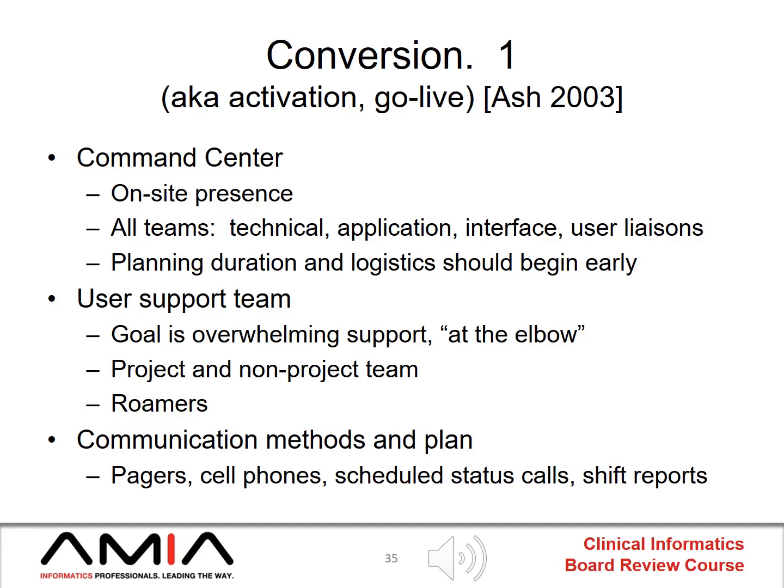In setting up a command center, one needs to consider logistics: where is it going to be, how large will it be, what workstations are needed, and so on. The command center is a place that minimizes the friction of communication between groups working on the system, because they're all quite literally right next to each other, and it's easy to check if a problem is related to one aspect of the system or another.